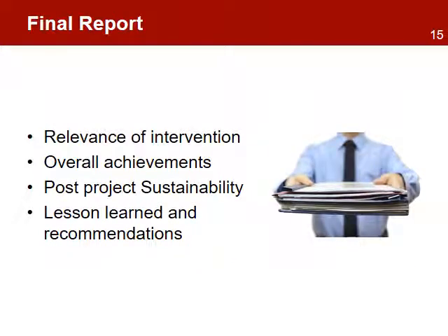Final reports include information to assess the relevance, the achievement of results, and sustainability of the intervention. The report might include information from the summative evaluation with lessons learned and recommendations for the next phase or future projects. The final report is a donor requirement at the end of the project and may require specific information.